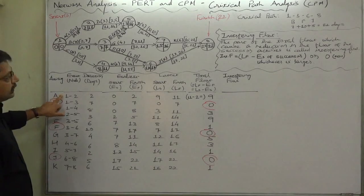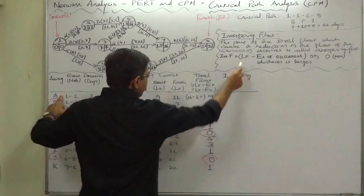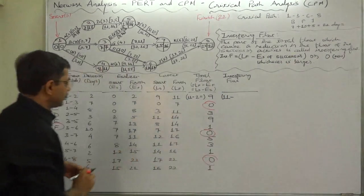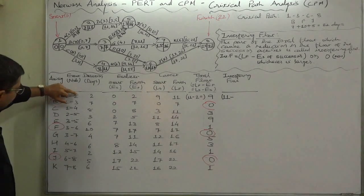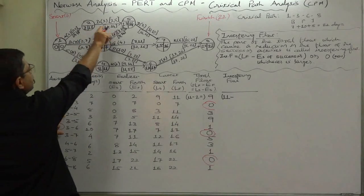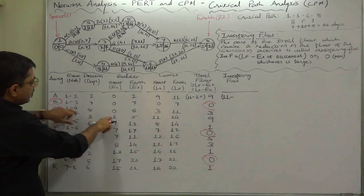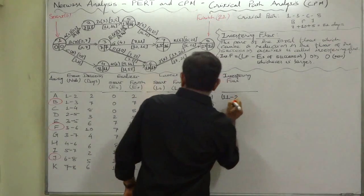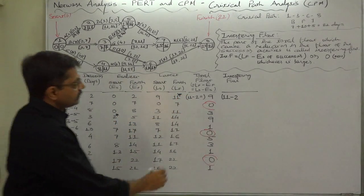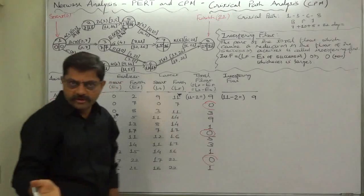Let's take the interfering float of activity A. Latest finish time of activity A is 11, minus earliest start of successor. Which one is the successor of A? A's end event is 2 and start event of D is 2, so D is the successor. Earliest start time of D is 2. So 11 minus 2 equals 9. 9 or 0, whichever is higher - obviously it is 9.